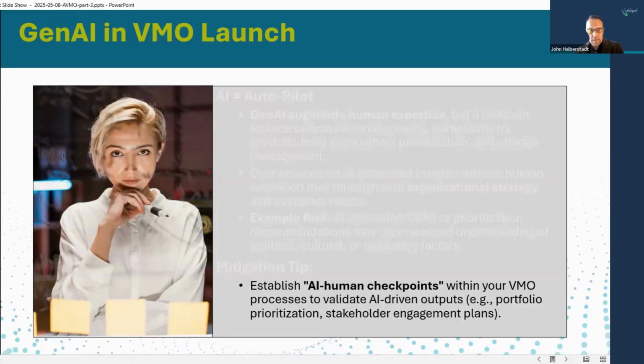I will say, for example, I've experimented, we talked about it, I think, in the last session, with using these tools for using WSJF and prioritizing the MMPs or the epics. To me, that was interesting for things that it had enough information in its model to assess. But there's going to be other epics that are very much company specific, and the idea that it could understand business value or time criticality or operational efficiency, it may not have enough information to be able to calculate those properly. So that was an interesting exercise, but we really want to take a critical eye to it because it's going to look professional.